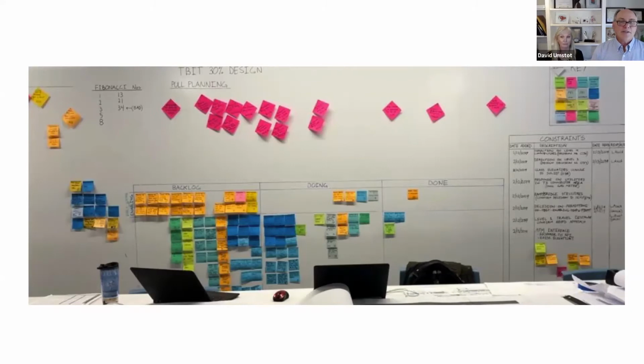They've got a key. They've got all their major milestones from the full plan up top that they're trying to hit. And you'll notice that they actually put the Fibonacci numbers up there: 1, 2, 3, 5, 8, 13, 21, and 34. And parenthetically next to 34, it says bad, okay? Because they were having trouble getting the 34 tasks done in time. So one of the countermeasures was to break that into smaller pieces of work.